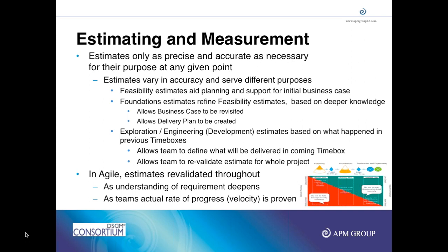we are doing a workshop. Everyone has 13 cards with them. For each story, we display it on the whiteboard, and then people discuss a bit, and then they pick up how they rate this card, and they put that card down. Then at the count of one, everyone turns their card, and we note down what ratings we have received. As long as people have given 5 or 8, it is very near, so there is not much difference of understanding. But if the variances are very high, then it's really different understanding between people, so this needs to be sorted out fast.